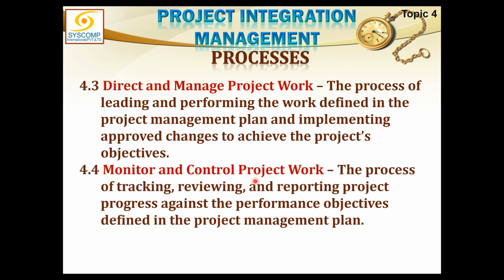Monitor and control project work is the brains behind it. Direct and manage project work has absolutely no authority whatsoever to change the plan. It can request a change in the plan, but it cannot change the plan by itself.